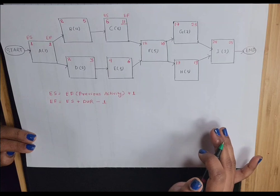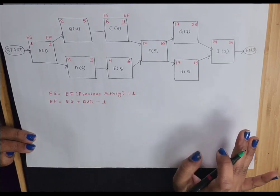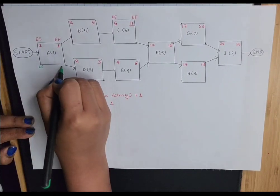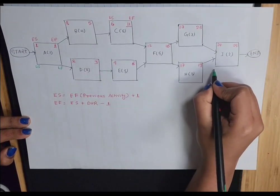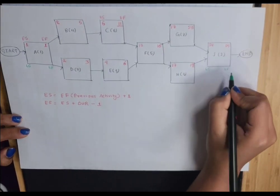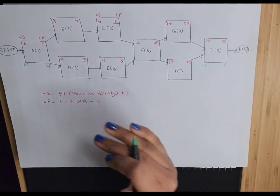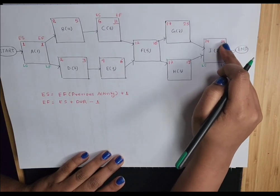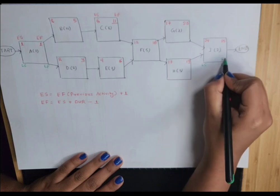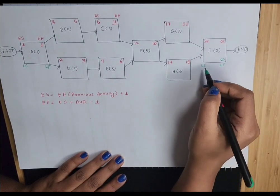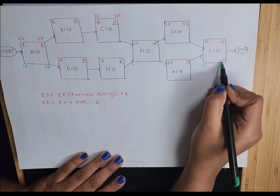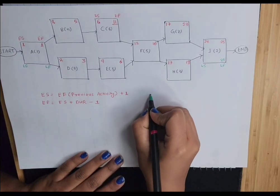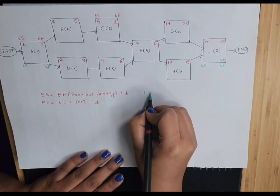Now let's calculate the late start and late finish for each activity. The bottom left corner will be late start and the bottom right will be late finish for each activity. This time we are going to move backwards — it's called the backward pass. For activity I, late finish is 25, same as the early finish, so that stays as it is. Late start will be late finish minus duration plus 1.